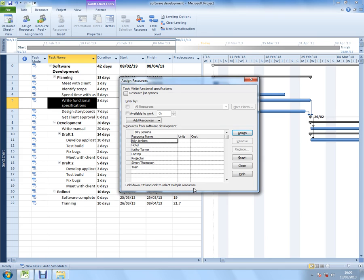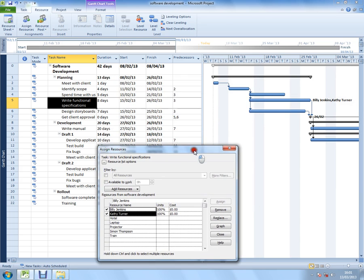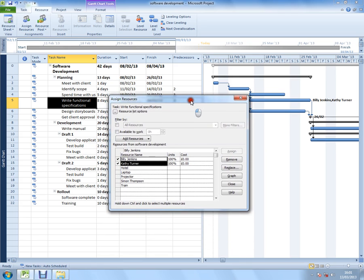A quick description of that - if I hold down control and select Kathy as well, so I've got Billy and Kathy, and I'll click assign. They're being assigned at the same time by holding control. These are both work resources with 100% of their time. I can see it's quite happy in the background accepting these resources. You can see on the right they've been added to the end of the Gantt chart.